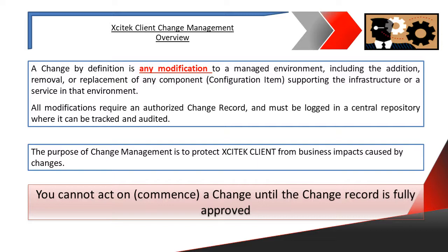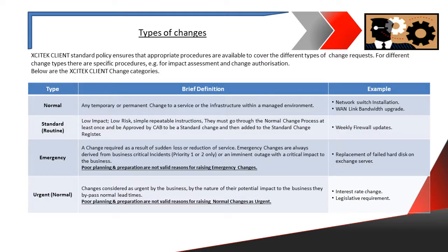The overall picture I'm trying to portray is that any change in the environment, for example, if you work for a bank and you have an application which needs an update. For a normal person, it is just a request that he wants to change some view or add something to his view in the application. However, in the background, it goes as a change request, and when a change is processed, it has to be recorded and checked with all the stakeholders. If any risk is identified, it has to be mitigated and rectified, and only then implemented.